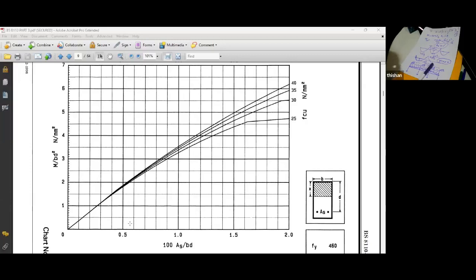So there are so many things. You'll find when you hire a big company, when you are a smart engineer, you can bring things down drastically. That is something I did recently in a project where the allocation for the foundation was 595 million. The original geotechnical engineering report produced a foundation of 800 million.